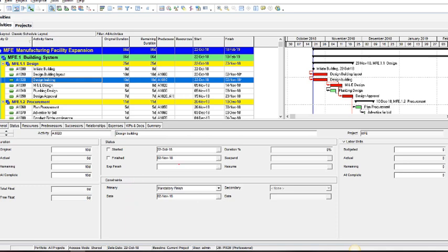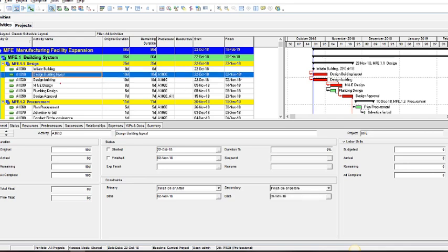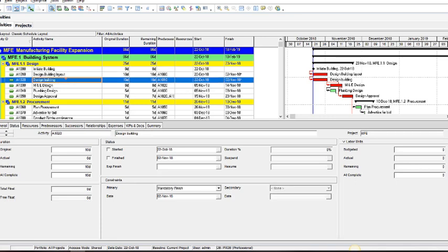So what we have just done is how to assign constraints to project activities. We've been able to assign an open-ended constraint and also a closed-ended constraint. You can decide which of these constraints you feel is best for you, especially with respect to an activity. If an activity has a mandatory start date, or must finish on date, or finish on or after, you can decide exactly how to assign these constraints.